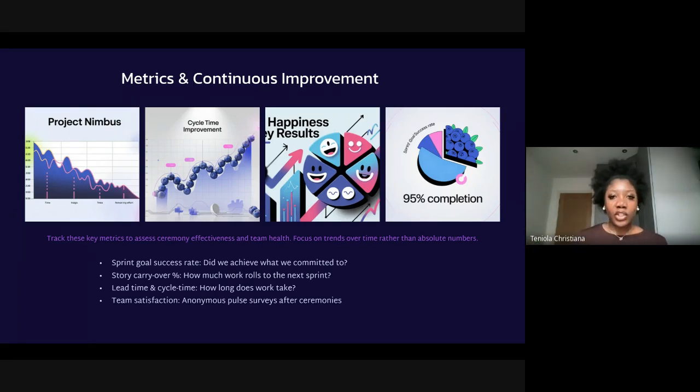How long does work actually take? If we have a story that we've estimated is going to take 5 working days and it ends up taking 8 working days, are we actually good at estimating? How do we get more specific and better at our estimation as a team?